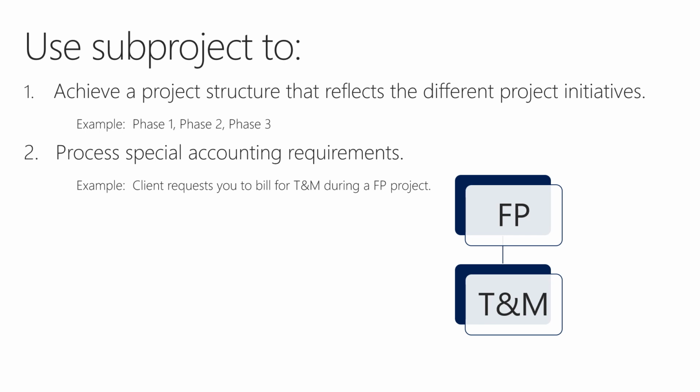Well, in native AX, you can't do that through a fixed price project, so you could create a sub-project of time and material type for the same contract, which means the same customer, and then you could log all the time and material that they want to be billed for to that project and then bill them in summary if you wanted to, a milestone from the fixed price and the time and material from the time and material project.